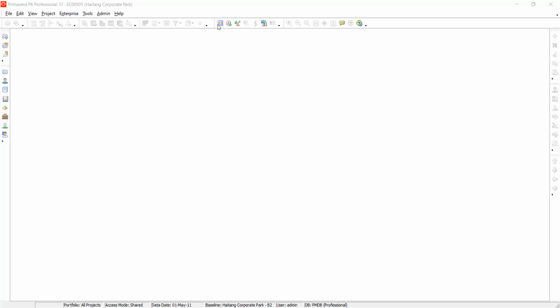Yeah, so that's how it ends up increasing the total project duration. Actually, you can see that before you do resource leveling and after resource leveling, there may be an increase in the days, the project duration. But we've understood why there can be an increase in the number of days. Yeah, that's where it comes from, like trying to split or push the activities.